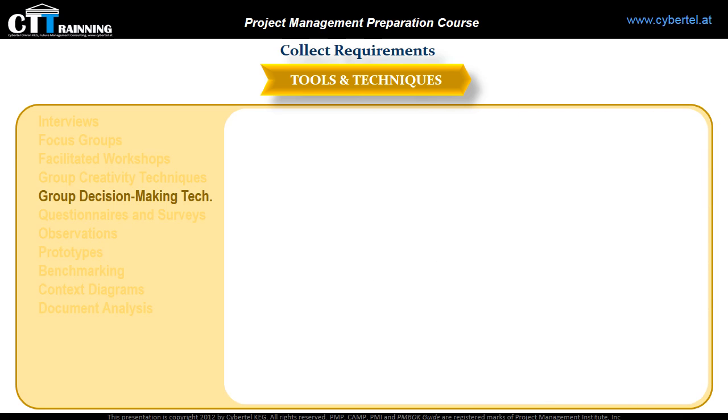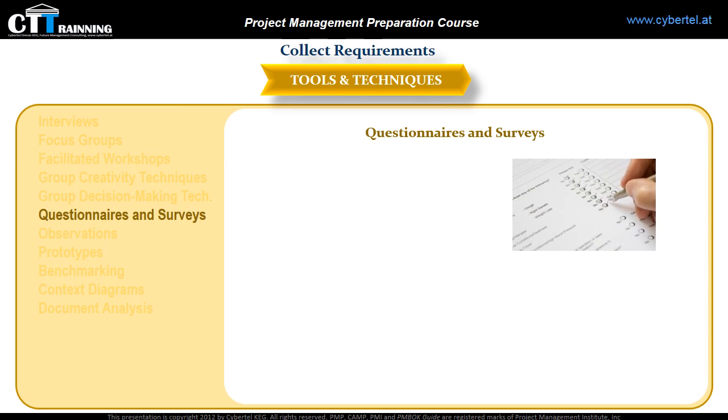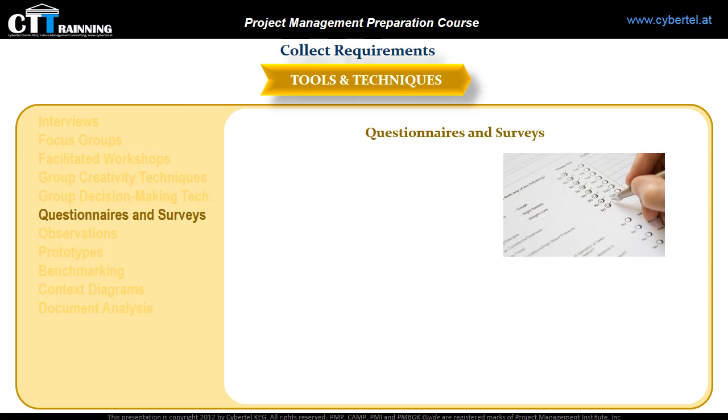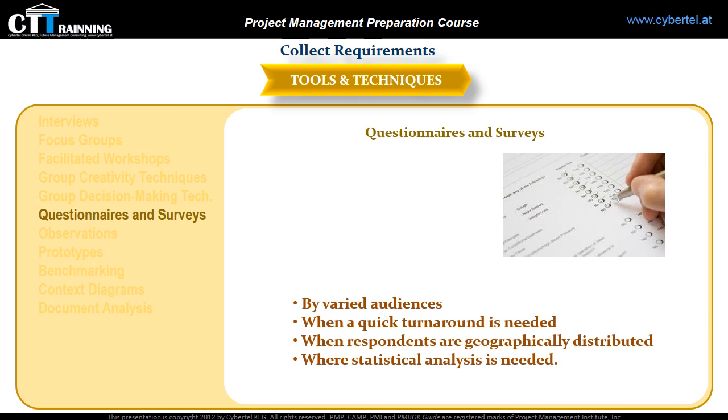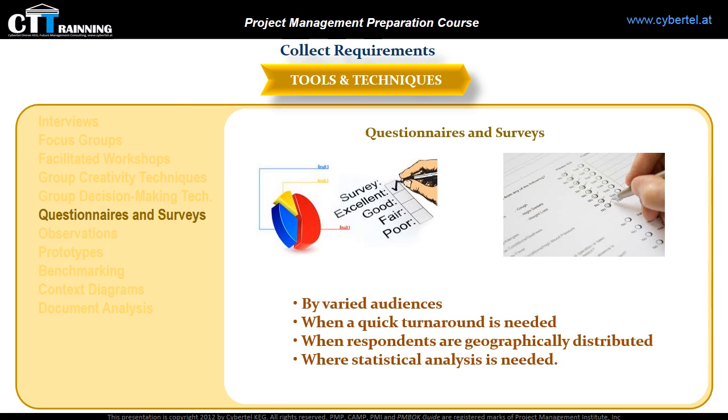The next tool is Questionnaires and Surveys. Those are written sets of questions designed to quickly collect information from a large number of respondents. When should I use the questionnaires and surveys technique? For example, with varied audiences, or when a quick turnaround is needed, or when respondents are geographically distributed, or also where statistical analysis is needed.